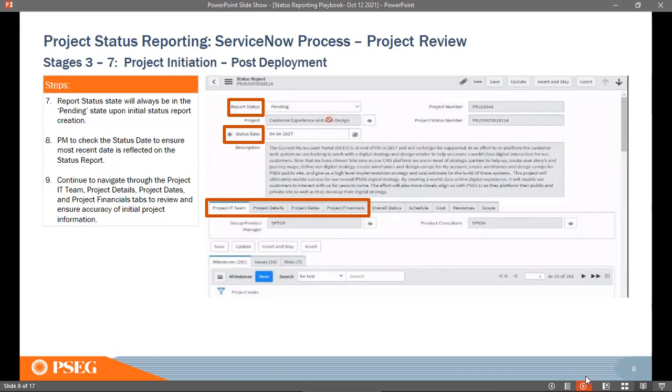That's one. Number two, on the financials, the same thing. If your budgets are not aligned and you have crossed your budgets, it is again going to be a non-compliance issue. So by year, you have to look at your funds approved for that year. If there are any changes, please get the justification documents quickly and get the funds aligned. This is again a request from the EPMO team to all the group product managers and project managers who have joined: please go back to ServiceNow, to each of your projects, and check for those two pieces. At least the easiest thing is the committed delivery date.